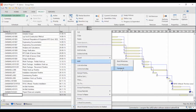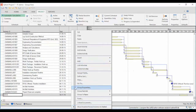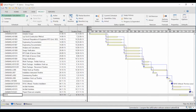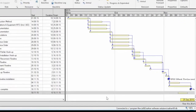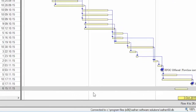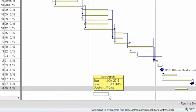The hammock will be inserted with a default duration of zero time units. Its duration will be automatically computed when you add predecessors for the hammock activities. Saffron Project's easy click-and-drag method gives the planner a visual approach to scheduling. People work better visually, and this feature allows planners to sketch out a schedule in seconds. To create an activity using the click-and-drag technique, just move the mouse pointer to an empty row in the bar area, place the pointer on the start date, click and drag.